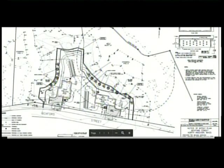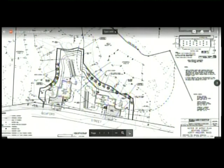I think it still stands, as was required in the ORAD, that the dump area would need to be cleaned up, and we could condition that and carry it over to this order of conditions from the ORAD. I've lost track. Where's the dump area? In ephemeral pool B. So we might need to put some conditions on a time of year for that as well. I haven't drafted it based on this being a plan that still requires waivers, but with that, I'll turn it over to the applicants to summarize further.